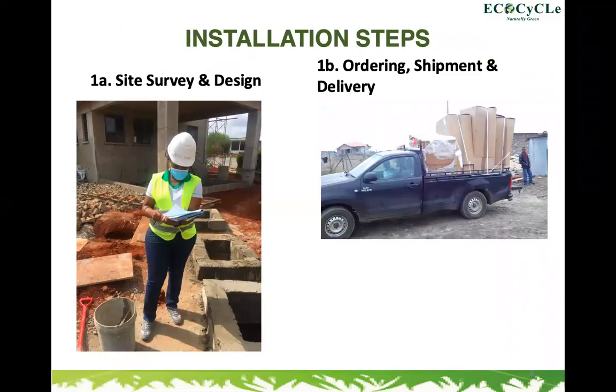Now in the next slide, we want to start looking at the installation steps. Now, obviously, when you come to us and you tell us you want a system, then the first thing we usually do is to come for a site survey, choose a site location. You can see that is Engineer Lucy doing a site survey. So we choose a site location and maybe mark out the tank where it will be. And then after the site survey and the design of the tank, then tank construction can begin.